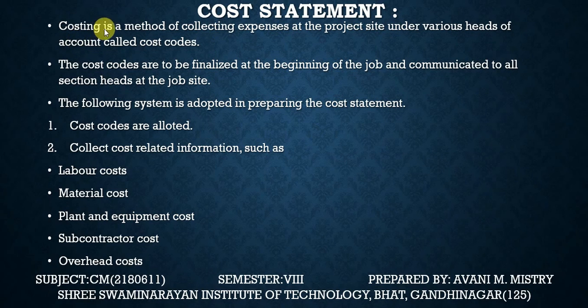Cost statement. Costing is the method of collecting the expenses at the project site under various heads of the account called the cost codes. Okay, the cost codes are to be finalized at the beginning of the job and communicated to all the section heads at the job site.